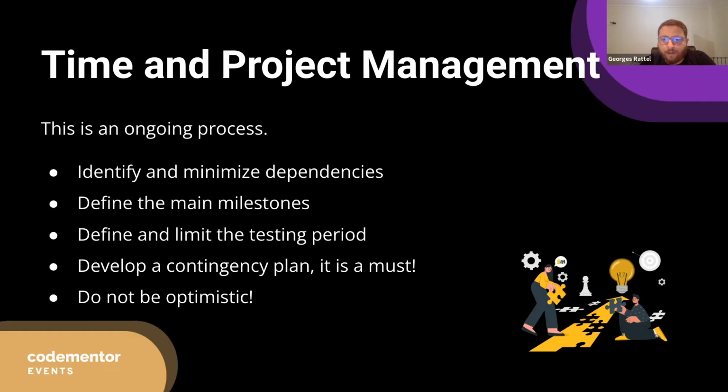You cannot expect the testing period to take 30 days when the project development is like 3 months. You need to say, okay, during development, I'm going to develop this feature in 20 days, and then I expect the client to test for like 10 days. During that, we will have a lot of feedback, and then after that we'll fix, and then there's another testing period for X days, and then this phase and milestone should be done.